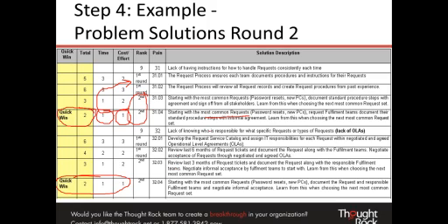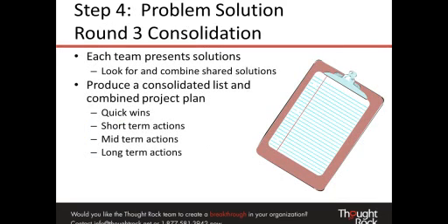We can put all of these solutions into a larger project plan, and basically you've done the job of the project manager. You've got the long-term plan. Based upon your time and cost efforts, you can get a sense of the midterm plans and short-term plans and then the quick wins. So this gives you ultimately your roadmap as well as your initial activities to get you started.